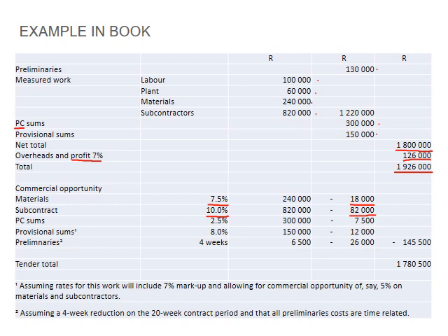82,000. You might also find at tender stage your subcontractors might price a little bit higher because they don't know the exact scope, but you anticipate as the scope gets clearer that they might give you a discount on the appointment, and you can actually negotiate a lower term with them.